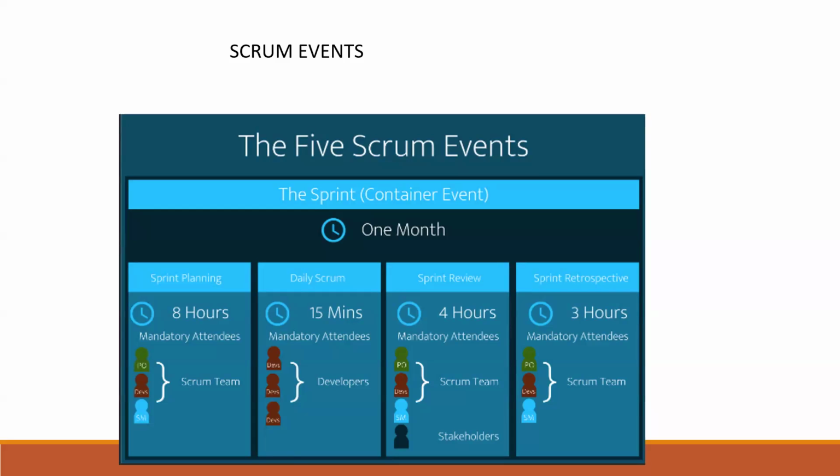So on day one, let us say if you're starting on Wednesday or Monday, day one is going to be the planning, which will go for 8 hours. And after 8 hours, you will start working on it. So this 8 hour plan will happen on day one.